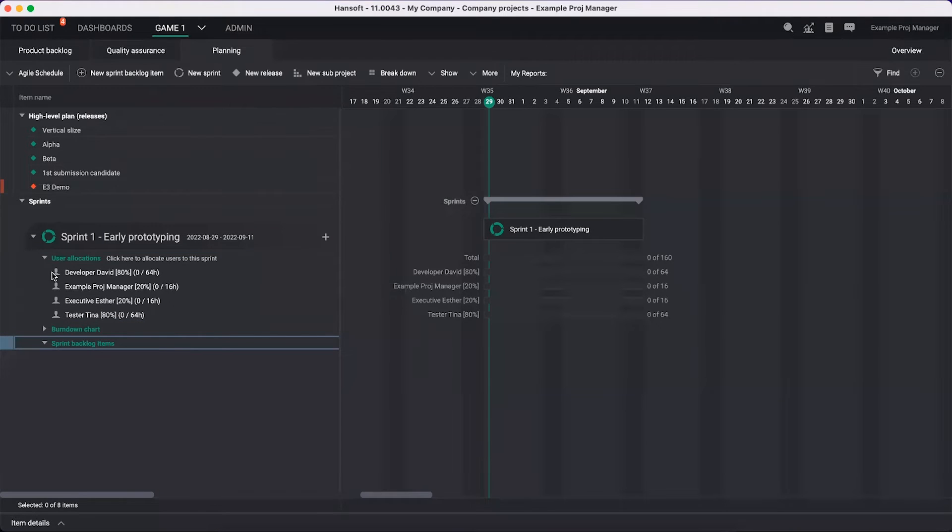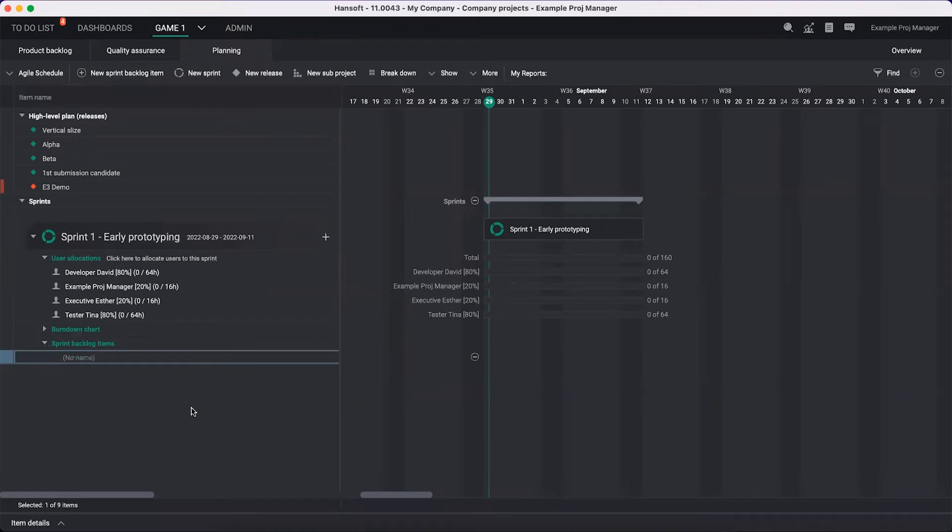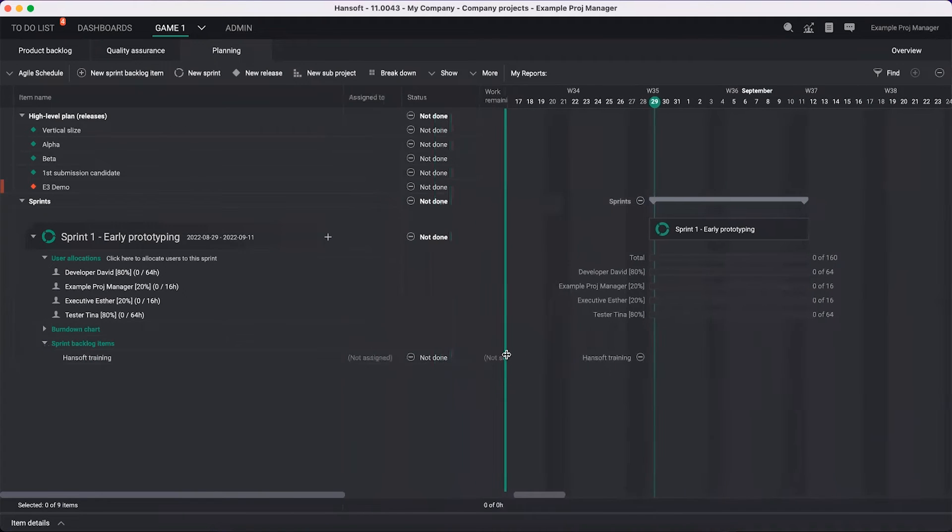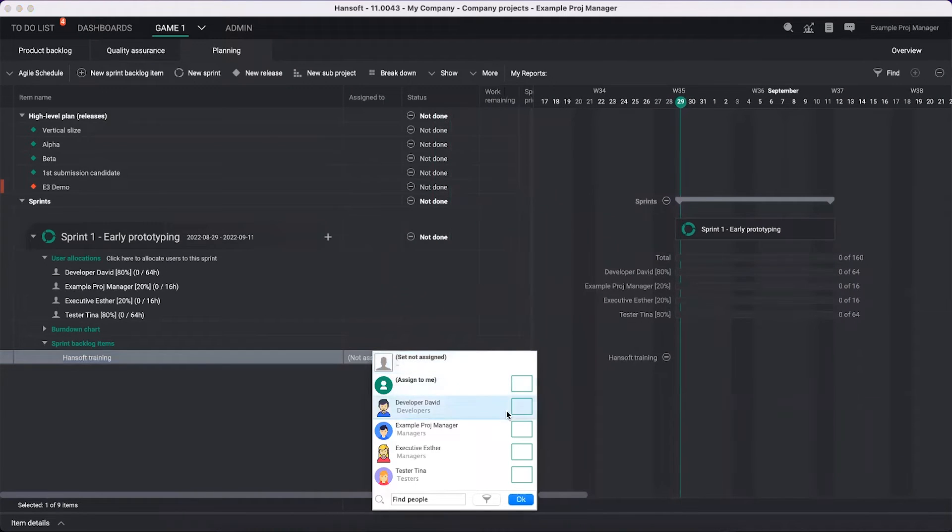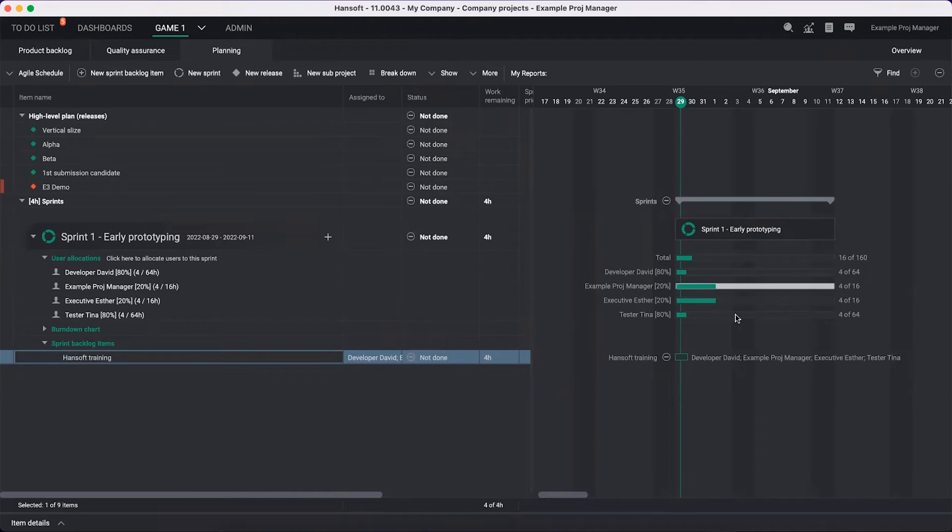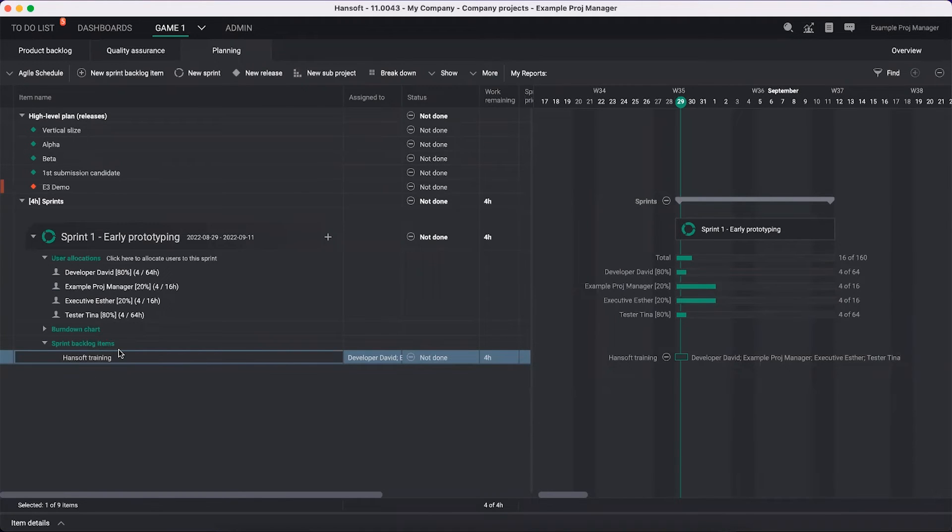The sprint backlog has different sources of work. One could be that I just want to take a new sprint backlog item here. I want to say we're going to do a Hansoft training. I'm going to assign everyone in the team to take this training and everyone will spend maybe four hours on this. So now we're laying out four hours. You can see, depending on people's percentage, we have different length of the bar here.